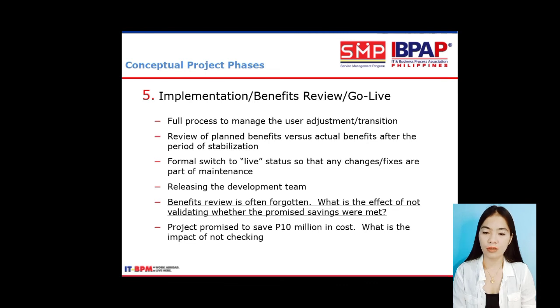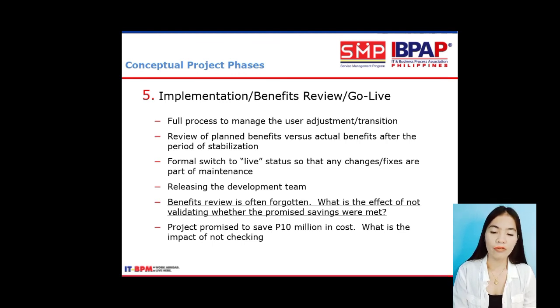Benefits review, go live. Full process to manage the users' adjustment, transition, review of plan benefits versus actual benefits after the period of stabilization. Formal switch to live status so that any changes, fixes are part of maintenance.